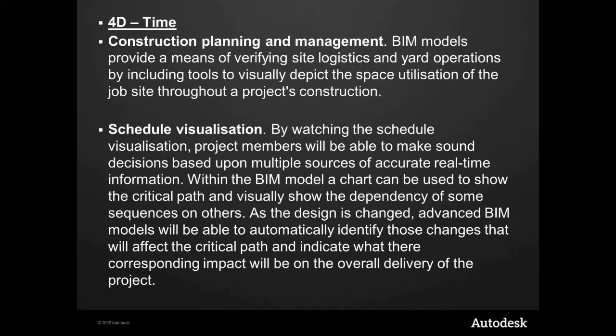So 4D. 4D is all about time. So visually determine the project status based upon a timeline. So construction planning and management. BIM models provide a means of verifying site logistics and yard operations by including tools to visually depict the space utilization of the job site throughout a project's construction. So it's linking events within the project to a model and then having a real-time update of the status of the model based upon a given time frame.